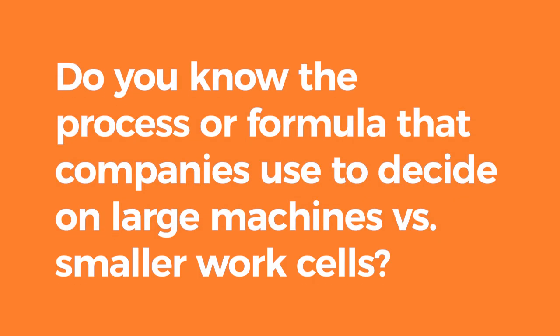If your URS was missing line items, each one of those missing line items will end up as a cost, a change order, and those are never good conversations to be had with management.